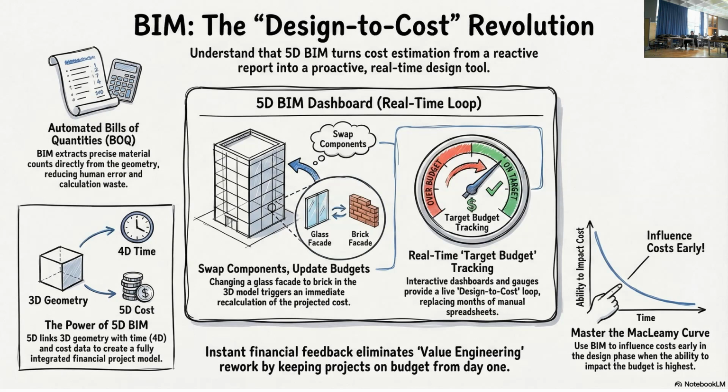This is our ability to influence costs. In time, our ability to influence costs goes down. This is why, if you want a luxury restaurant and you want to change the dimension of the space to keep the luxury level high, you must do it at the early stage. You cannot change the dimension later. The whole thing will be gone.